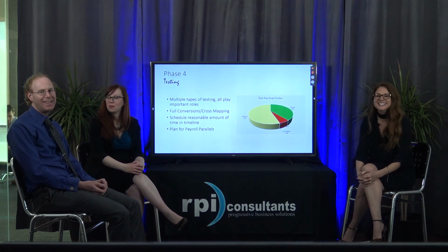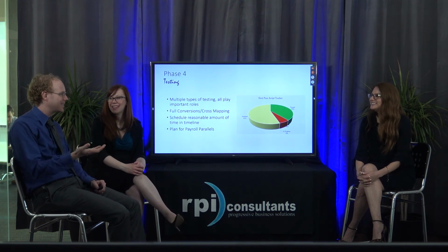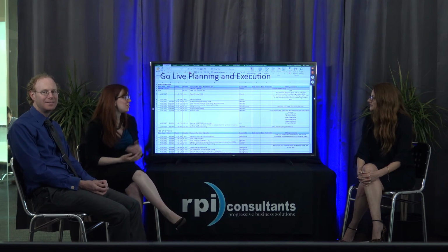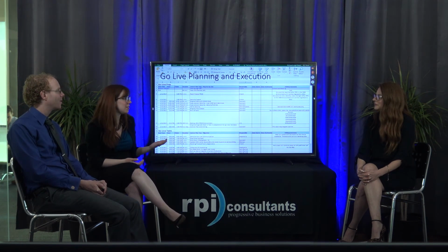Yeah, so maybe Teresa will take us through, once we've completed our successful testing, how do we get our system live? Yeah, so we jump into go live planning, and I think something that's really important is that this isn't something that happens after testing. This document and your cutover plan, that planning actually is going to start 3 or 4 months prior to when you go live. There's things to take into consideration.